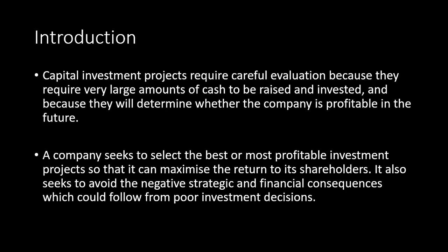If, for example, your cost of capital is 9%, and you find that your internal rate of return is below 9%, it already shows that your project is not viable because your internal rate of return, which in this case is your equity return, is the rate at which NPV is 0. So any project whose internal rate of return is below the cost of capital is not profitable.